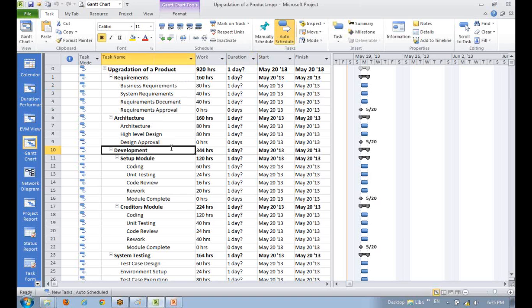Correct? Vivek, so as default, is it not taking one resource and accordingly based on one resource? I was assuming the duration column should. No, it's not taking by default. It is waiting for you to assign a resource. Okay. So that means the duration column right now will not automatically get calculated. Yeah, it will not update. When you assign the resource, it will get updated.